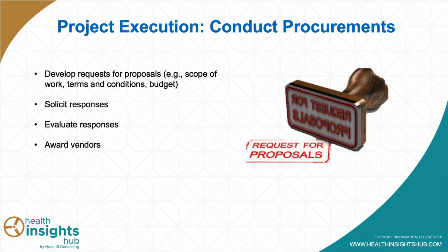You're going to go ahead and post it and send it out to all your vendors, let people know that it's available and that it's on the street. You're going to give them time to respond, which again can really impact and drive some of your project timelines, especially if it's a longer response. It could take several weeks, months for that response to be completed and submitted back to you.